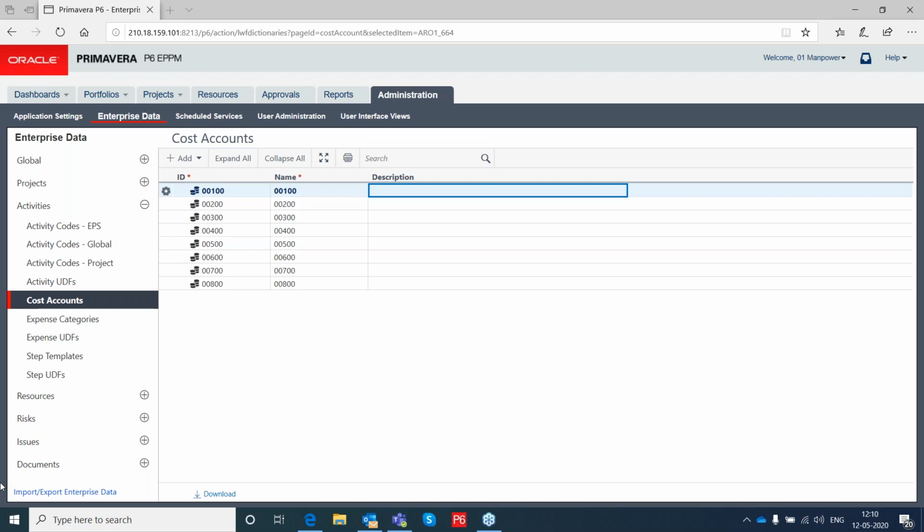For comparing budgeted and actuals, you have the activity usage profile view, which is available there in the optional client. You can have a comparison between budgeted and actuals. But end of the day, with respect to BOQ, it's not possible in EPPM, to be frank, because EPPM is mainly based on the activities and resource level we are auditing. But if you want to cross check against the BOQ or the scope, then obviously Unifier is the best choice. EPPM does not work based on BOQ.